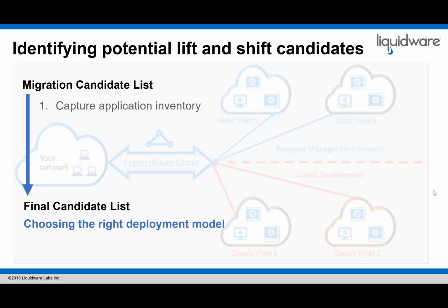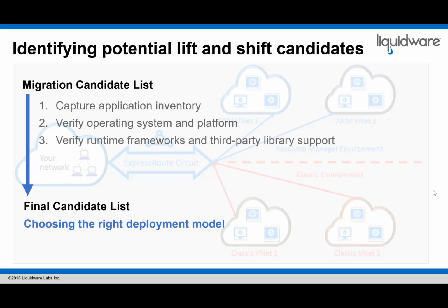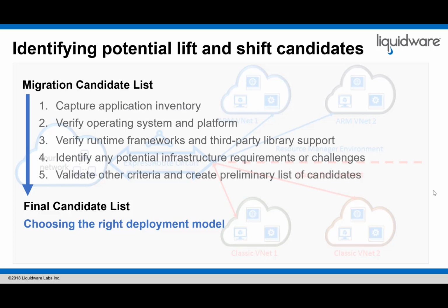The process of identifying applications suitable for lift and shift is essentially a multi-stage filtering process. Your team has to look at each application and service you're considering as a candidate for moving to the cloud, and then generate a list of the hosting resources used by applications, including both physical and virtual devices. At the end of this process, you should have a list of candidate applications you can successfully migrate to Azure hosting with a minimal re-engineering investment. At this point, you can begin to focus on how application and service workloads can take advantage of cloud-specific deployment models.